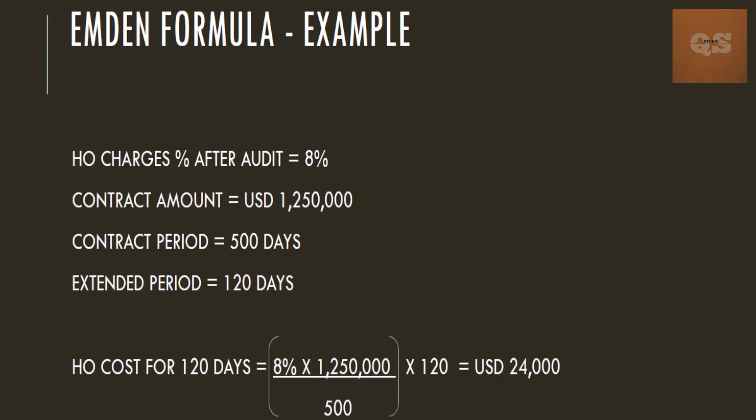For example, you have worked out the head office charges after audit as 8%. Your contract amount is 1.25 million US dollars, your contract period is 500 days, and your extended period is 120 days. Similar to the Hudson formula — except that the percentage is calculated through audit rather than taken from the tender document — it will be 8% multiplied by 1.25 million US dollars, divided by 500, then multiplied by 120 days. When you calculate, you get approximately US dollars 24,000.